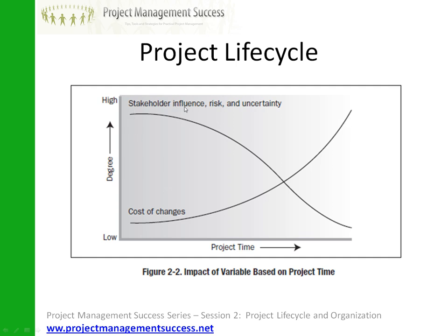Also over here, the stakeholder influence, risk and uncertainty is high at that beginning phase, and you'll have a much heavier stakeholder influence and engagement here to ensure that risks are mitigated, that expectations are going to be met, and that they understand what you're building and are happy for you to proceed. Once all that is organised in the early preparatory phases, the level of risk and uncertainty tends to drop off, and the stakeholder involvement can also decrease, which can be a bad thing depending on the project.